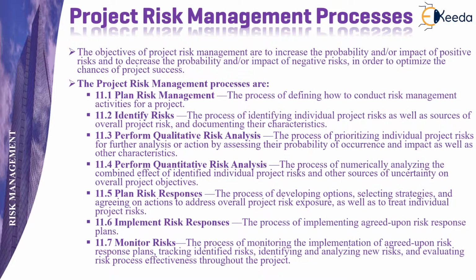For quantitative risk analysis, the process of numerically analyzing the identified risks begins. In plan risk responses, the process of developing options, selecting strategies, and agreeing on actions to address the overall project risk exposure and to treat these risks is carried out. Implement risk responses is the process of implementing the agreed upon risk response or mitigation strategies.